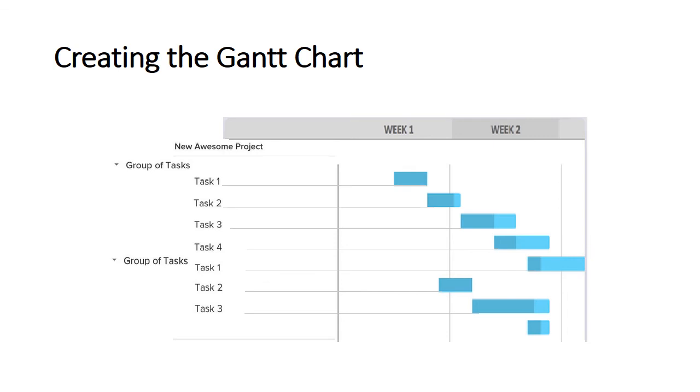A Gantt chart can be drawn quickly and easily and is often the first tool a project manager uses to provide a rough estimate of the time that it will take to complete the key tasks. Sometimes it is useful to start with the target deadline for completion for the whole project, as it is soon apparent if the timescale is too short or unnecessarily long. A detailed Gantt chart is usually constructed after the main objectives have been determined.